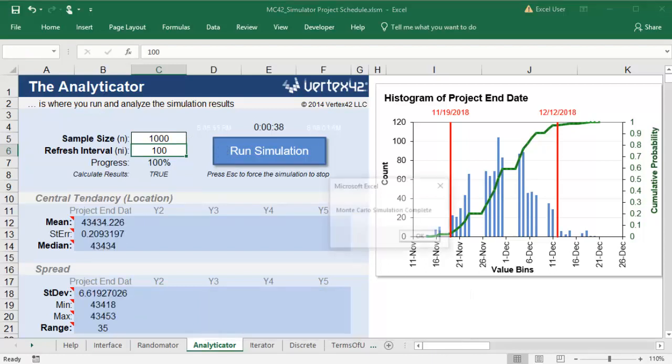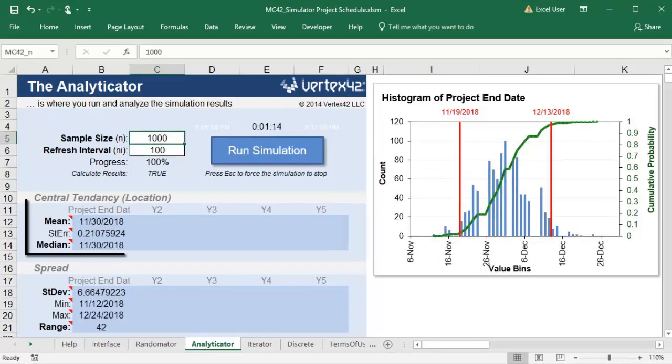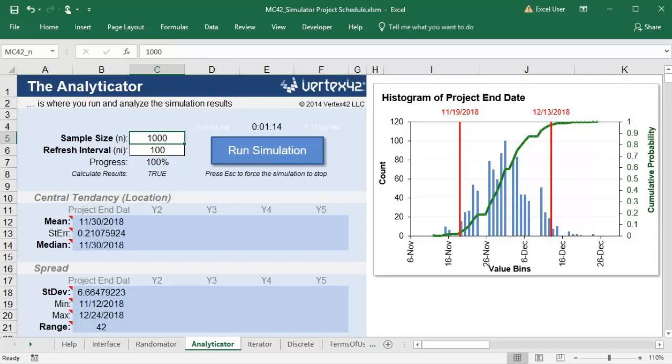When the simulation finishes, I can see the projected end date of my project. I also get a histogram that shows the distribution of possible end dates for my project. In my case, the project will always finish on a weekday, so there are some holes in the histogram where the weekends are.